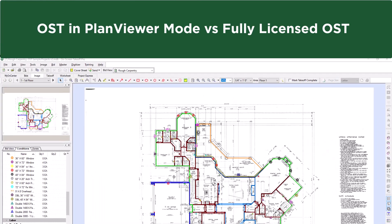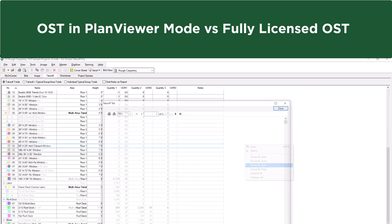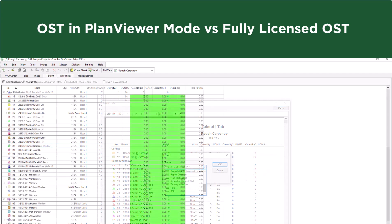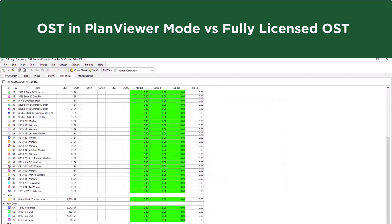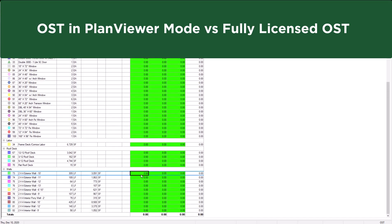With takeoff quantities actually saved, you can view the totals on the Takeoff tab, which can be grouped in a variety of ways and exported to various formats. Finally, unit prices can be assigned to each condition on the worksheet tab, allowing you to see a total bid amount for the takeoff you have created.